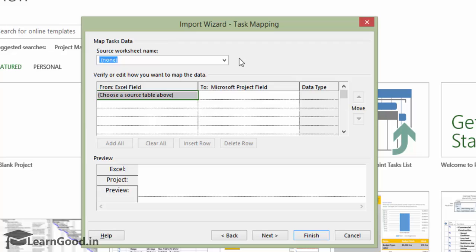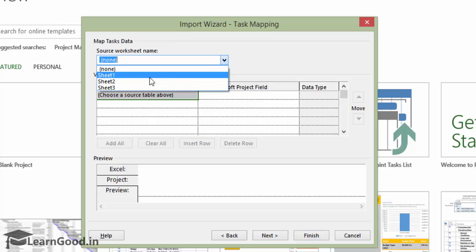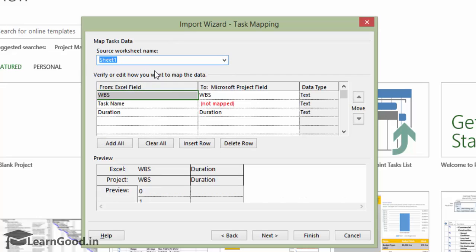This is the task mapping screen. We have to first identify where our data is located on the workbook. Remember, the workbook has multiple sheets, so I select Sheet 1 and immediately the header names get populated below.